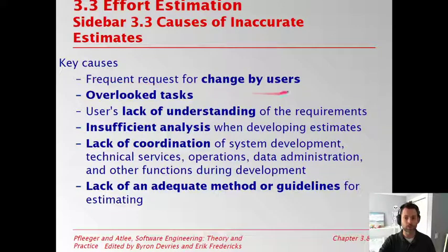If you're doing a waterfall type thing and you get a change request, it sends you all the way back to the top. If you're doing something more prototypey or agile, you can work that in, but you're still going to have to go back and reiterate or refine your models, for instance, right? That will take time and effort and money. We also might forget some things.